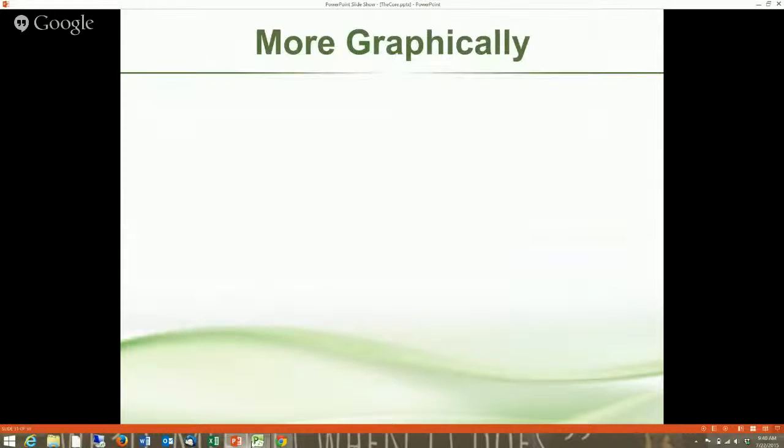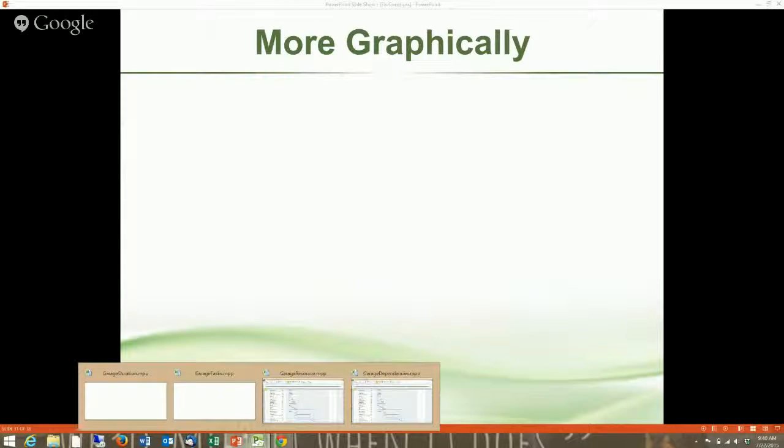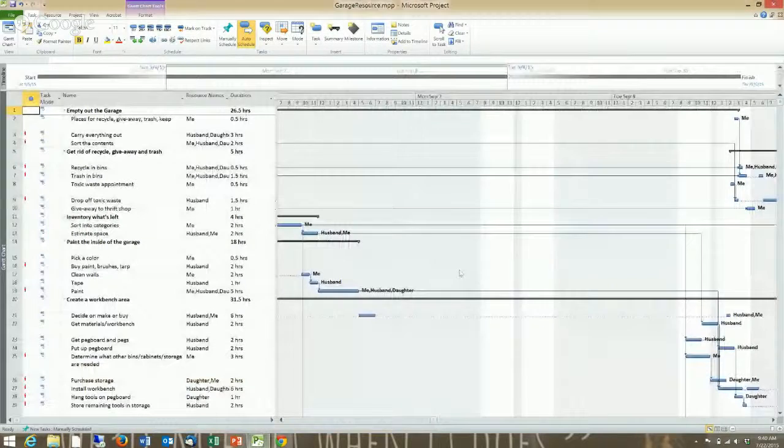Nothing else really here. But here's what happens when we add the resources. Our time moves out a bit because we can't have someone doing 2 things at once. That's not going to work. And so this is one of the nice things about the tools, is that they'll then take those into account. We have a whole set of resource functions, and it will schedule based on the resources.